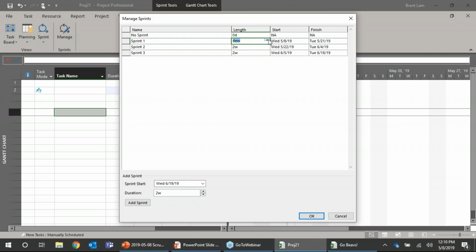Now, for some of you who either are brand new to Microsoft Project or maybe have never worked beyond the standard length periods, you'll see EW. That stands for elapsed. So what elapsed means is it's an entire calendar day. It's a 24. There's no constraints on it. By default, Microsoft Project has one day as 8 hours for its resources, right? And it's Monday through Friday. With elapsed, whether it's an elapsed day or an elapsed week or an elapsed month, it's the entire day, Monday through Sunday. So just be aware of that when you're going to choose this.